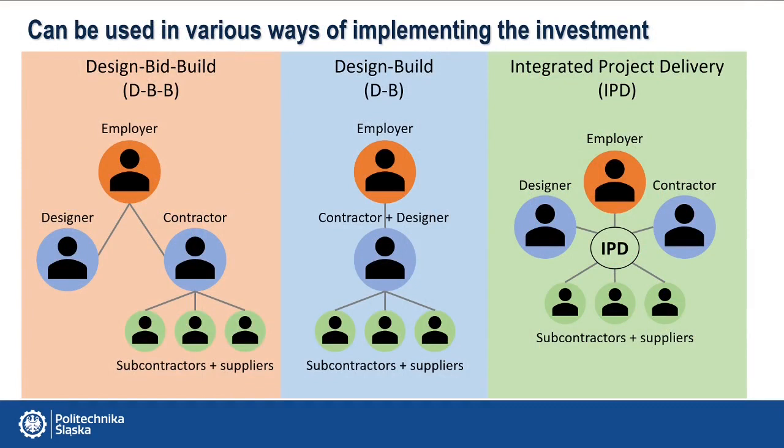BIM can be used in various models of construction investment implementation. First, the traditional design-bid-build approach, in which the employer orders the design documentation separately and then orders the construction of the facility separately on this basis. The second, more and more frequently used model is design and build, in which the employer orders the documentation along with the entire construction process in one contract. This is also where the BIM methodology works.